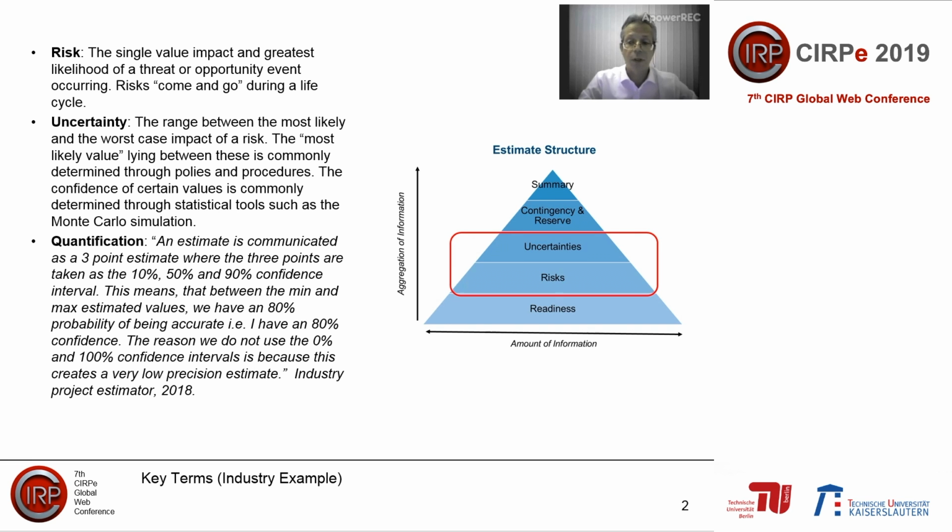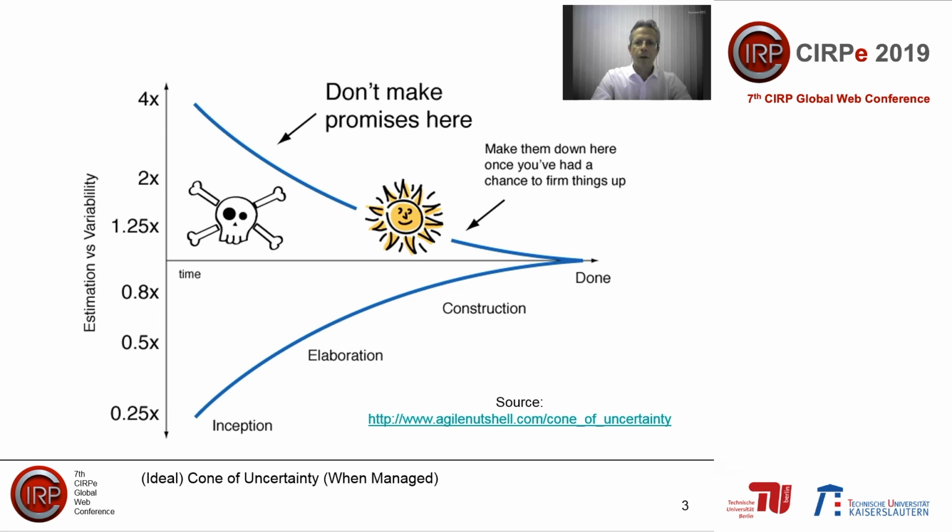The next question we need to explore is how these risks and uncertainties propagate over time, both from an actual and perceived perspective. The concept most commonly applied is called the uncertainty funnel. The uncertainty funnel describes the relationship of estimate variability over the life cycle of a product or project. The variability is mapped on the vertical axis and time is mapped on the horizontal axis. The focus on the evolving perspective of time differentiates this perspective from the static perspective generally used by most estimates.